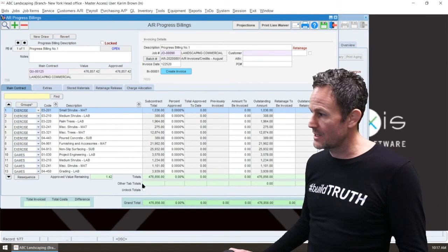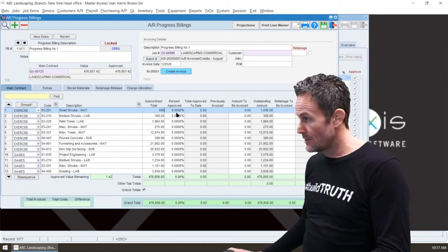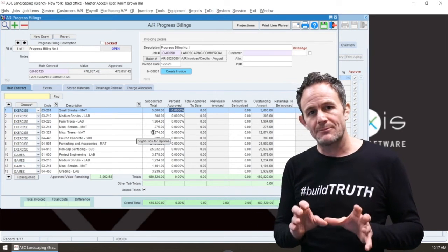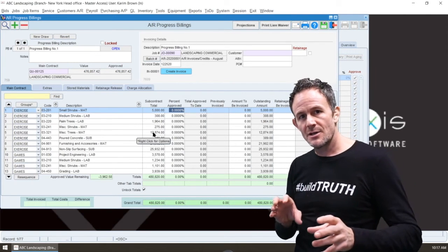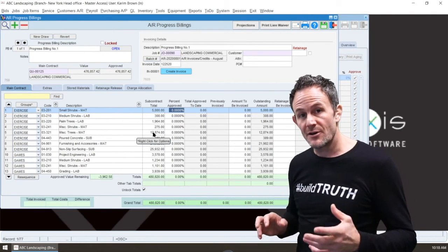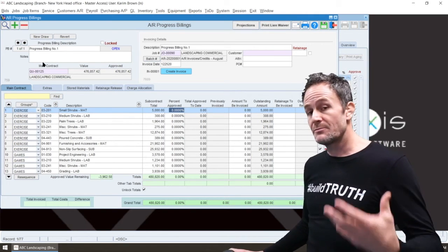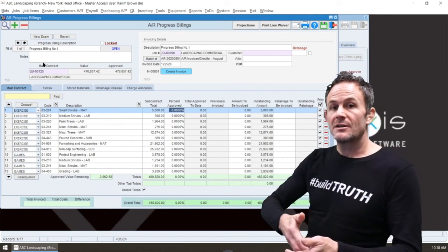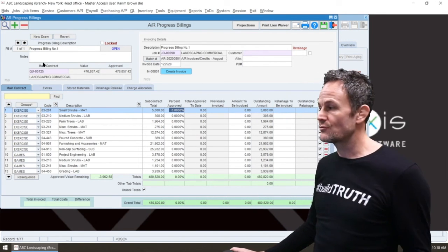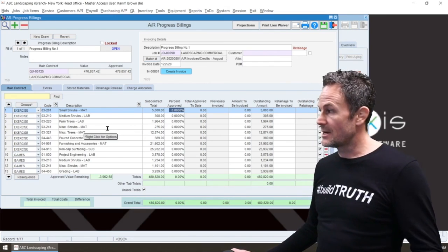You can unlock the totals and front load the SOV to make sure that you are capturing enough cash that relates to the risk that you are taking on that project. Now, of course, as you progress through the progress billings, it'll automatically increase to the next draw while keeping a full historical of the previous draws, while simultaneously taking off your retention on a line-by-line basis.